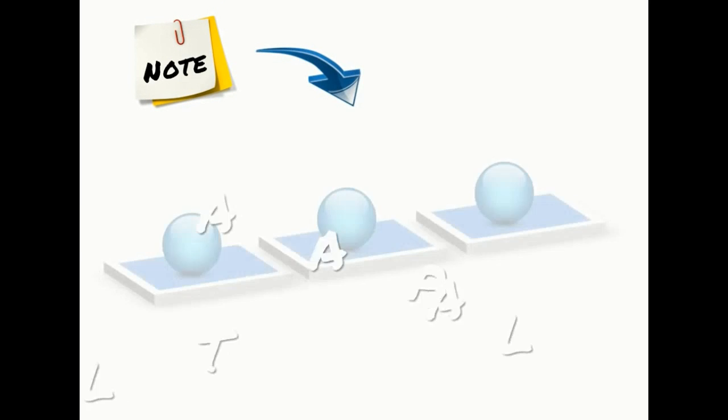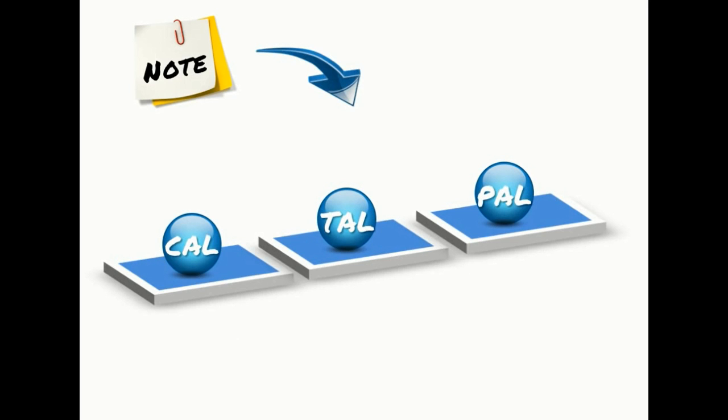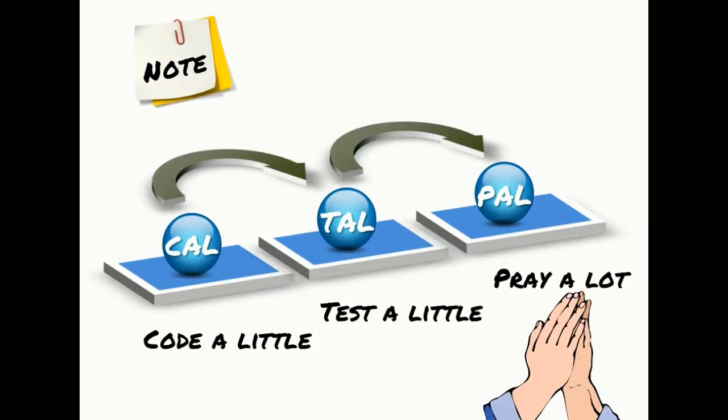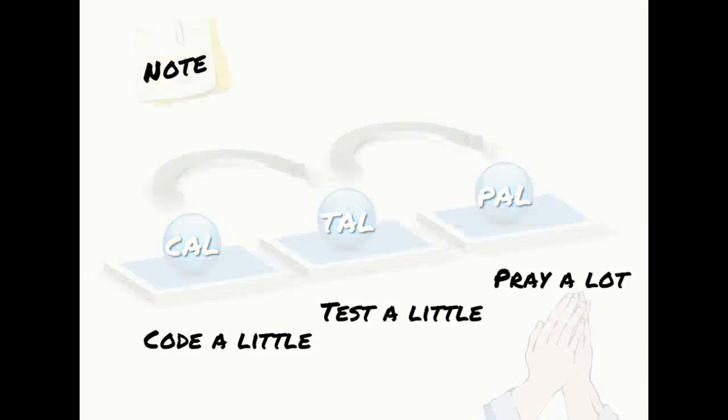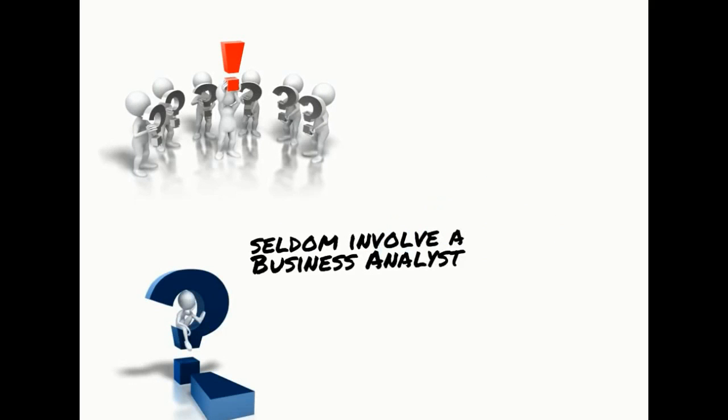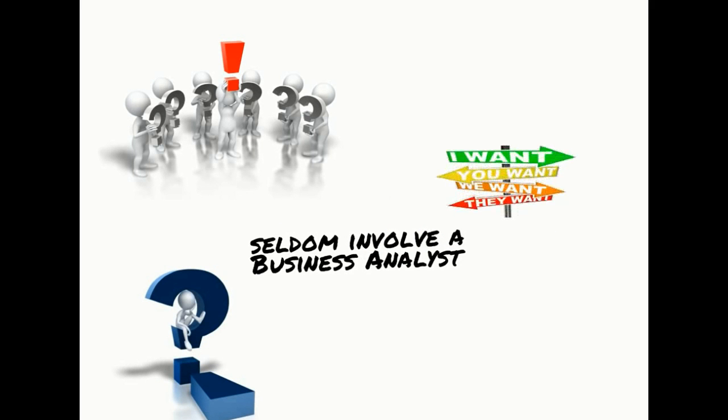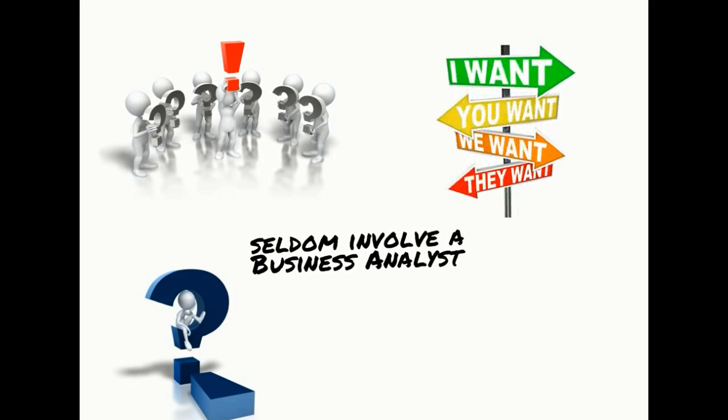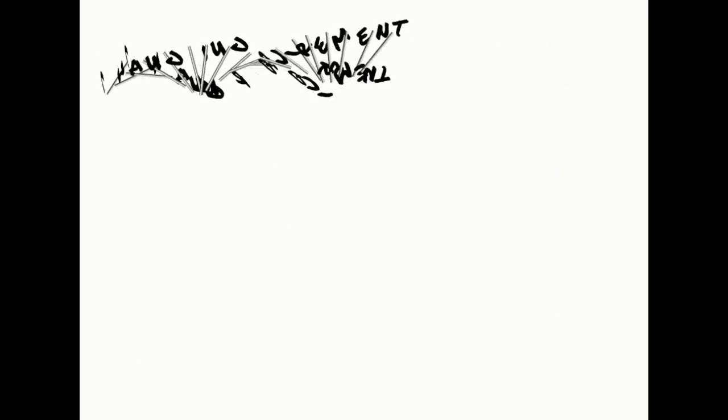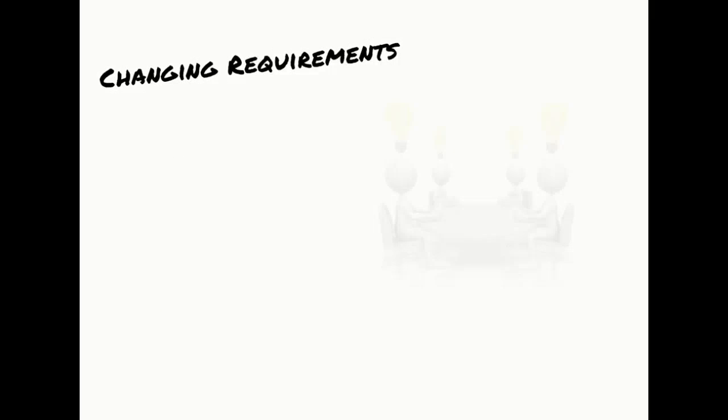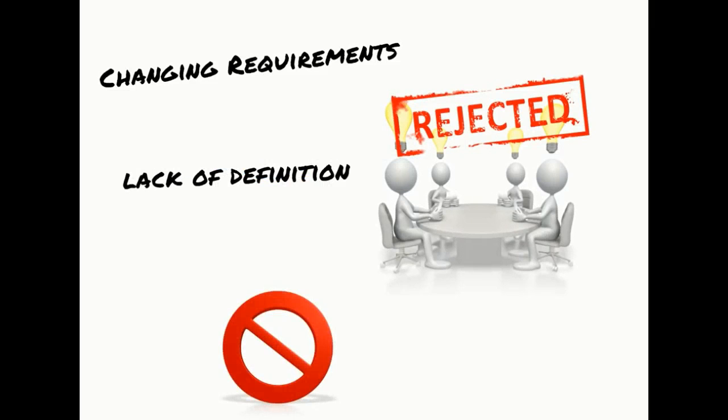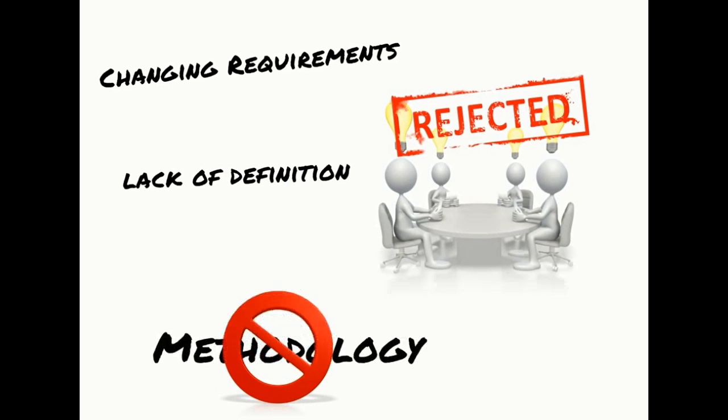There is a fourth approach, the ad hoc, a.k.a. chaotic approach, assumes you have very little knowledge of what you're doing or how to get it done. This approach is essential when a revolutionary new technology is introduced. There are no clearly defined activities or deliverables, and work progresses in a whatever-needs-to-get-done flow.